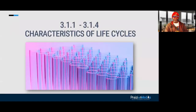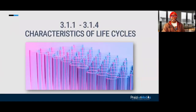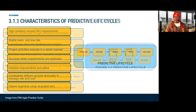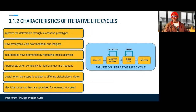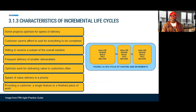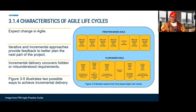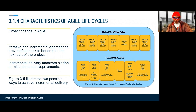Going into chapter three: predictive life cycles are done linearly; iterative life cycles have feedback loops where we repeat until correct; incremental life cycles have varying sizes of increments. There are two types of Agile life cycles — iteration-based Agile, where the cadence makes all iterations the same size, and flow-based Agile, where iterations are of different lengths and different cadences.